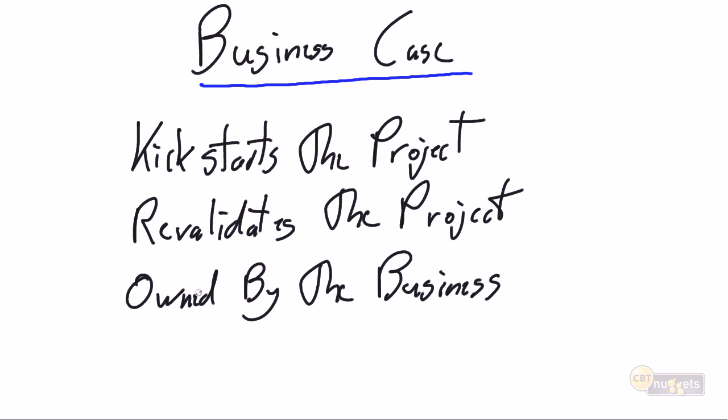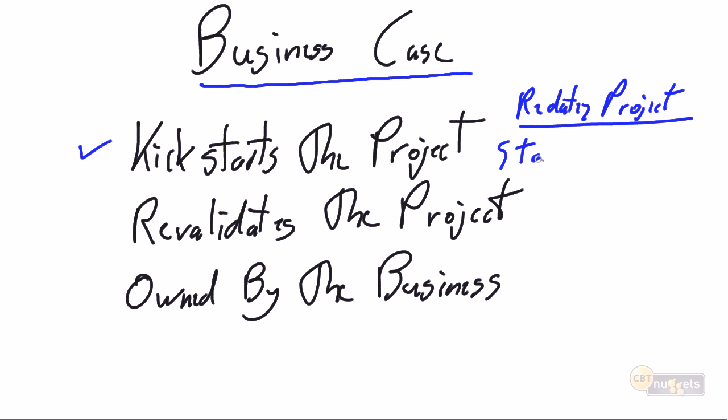The business case kickstarts the project. The business case actually predates the project, or it should predate the project. The business case is that documentation, again, Steve's term, not a Prince 2 term, documents the eureka moment, probably at an outline level, probably at a very high level, but the business case predates the project because it outlines that eureka moment. It defines what it is that the business wants, and it is used to start the project.